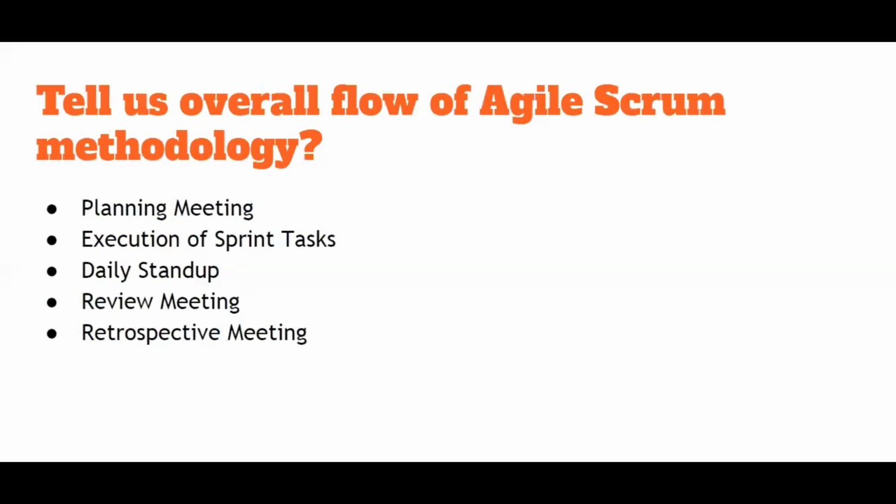Now, what can be a better example for this? Let's take an example. The very first step when you're actually working on Scrum is to have a Scrum team. We have a Scrum team of around 5 to 9 people, in which you definitely have a product owner, a Scrum master, developers, testers, whatever. And you decide the sprint to be of 4 weeks. The second step is we need to decide the sprint size, that is 4 weeks, so we have actually 1 month.